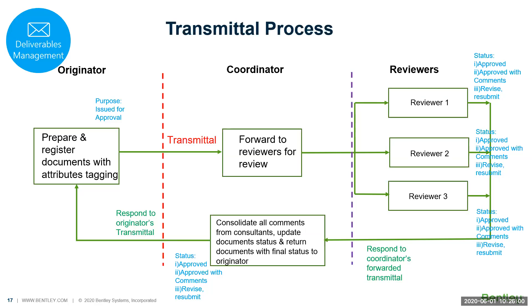If this transmittal, there are still one or two drawings that are not approved, then you will send the second cycle, second version of the transmittal. The first version will be the A version. The second version of the transmittal package will have the dash B. All this will be threaded in the system.